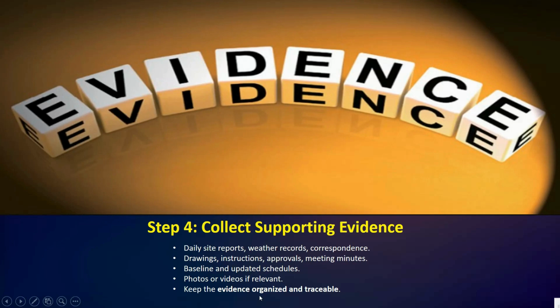Then keep the evidence organized and traceable. Each piece of evidence should be dated and traceable. For example, if an approval was delayed by 10 days, attach the letter showing when it was submitted and when it was approved. Organize the evidence properly, as clear documentation builds confidence and credibility in your claims.